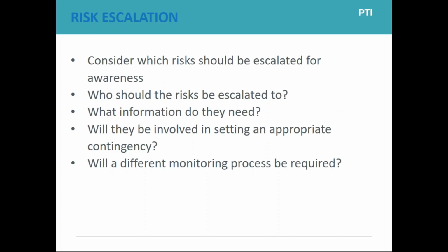For example, if one of the subcontractors has poor performance, although the subcontracted service provider is contracted by your main service provider, you as the sponsor are still important. You as the sponsor are still ultimately responsible. So you need to be involved in looking and managing and thinking of the contingency, and in fact being part of the solution if that risk actually matures into something that is an issue.